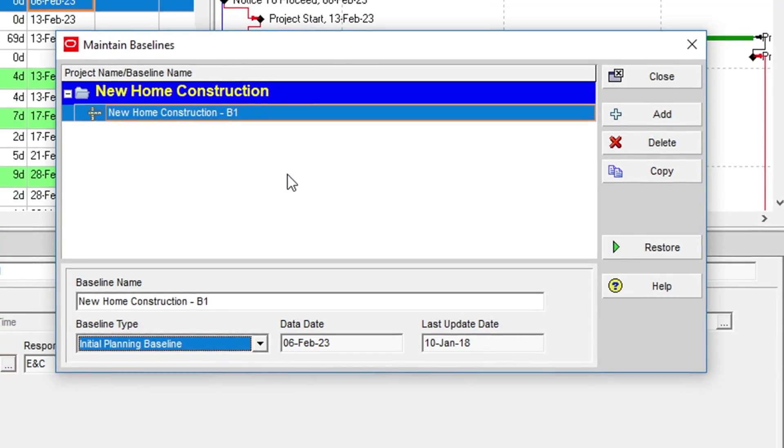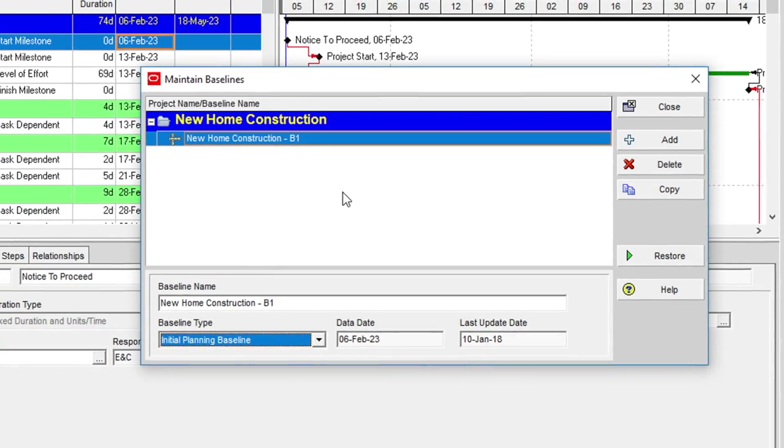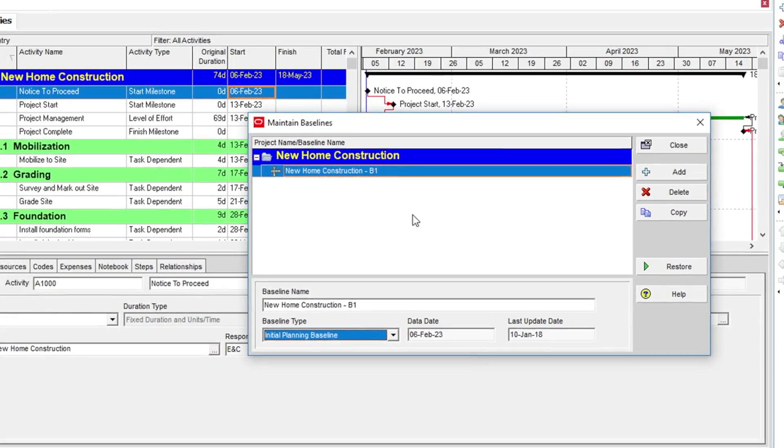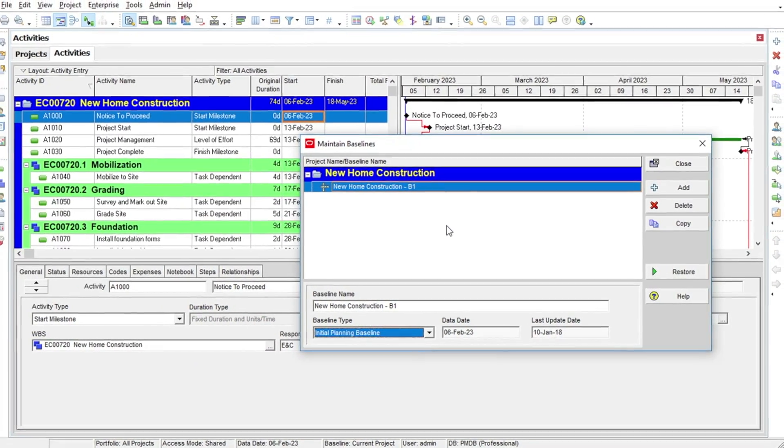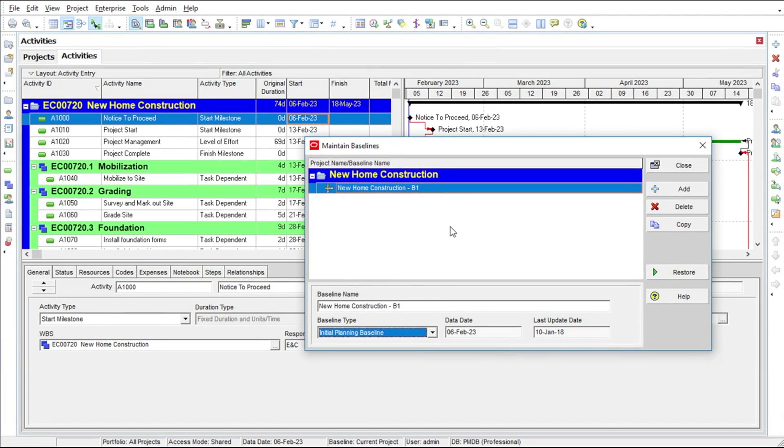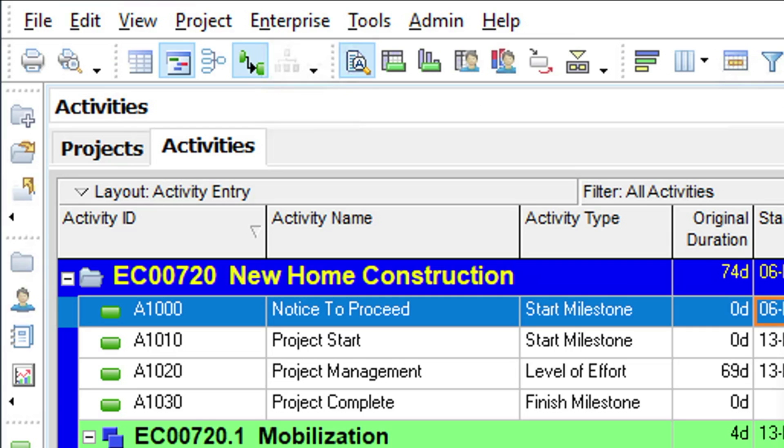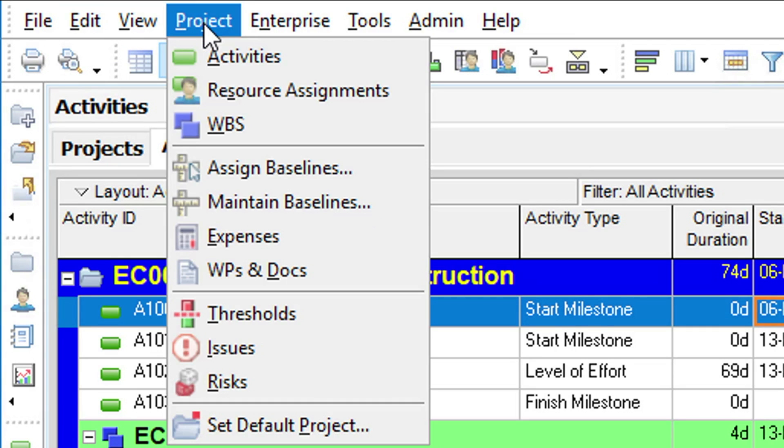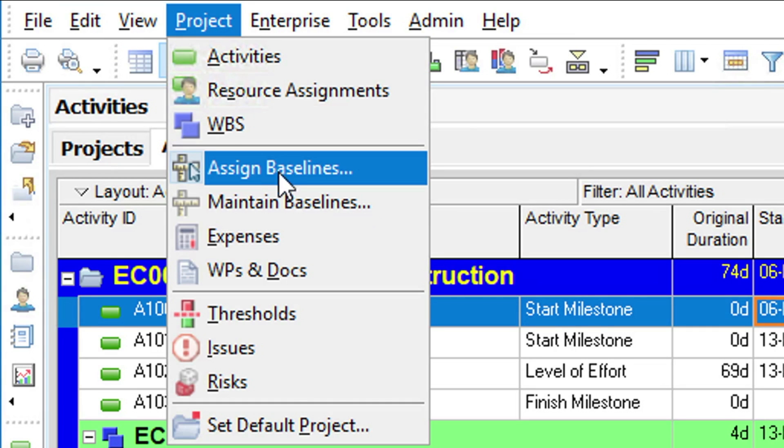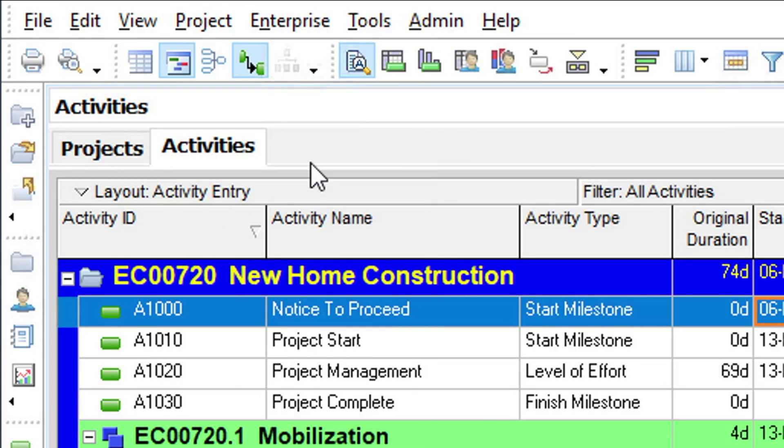So, let's look at how to assign this baseline to our New Home Construction project. Again, we return to the Project menu, and this time we choose the Assign Baselines option.